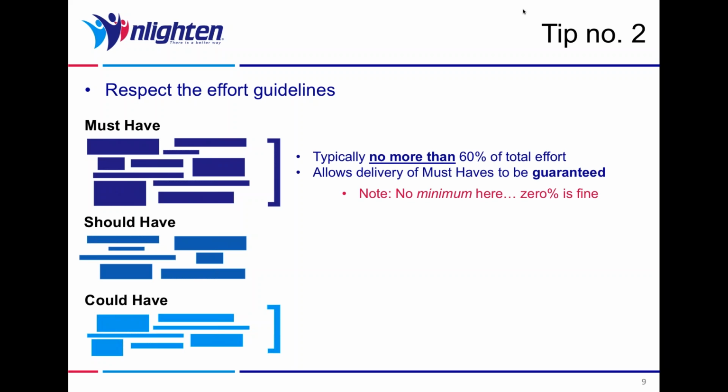Absolutely have to be delivered. Any one of those missing, we've wasted our time and effort in its entirety and delivered something of no value. So absolutely, we have to deliver the must-haves, and the way MoSCoW prioritization works, we set this up to guarantee delivery of the must-have requirements. No ifs, no buts, no excuses, guarantee delivery of the must-haves.